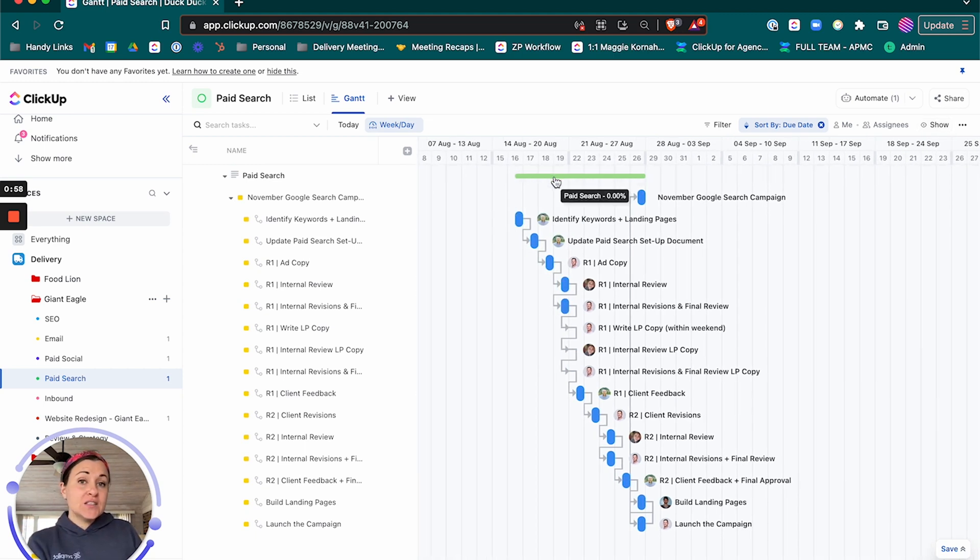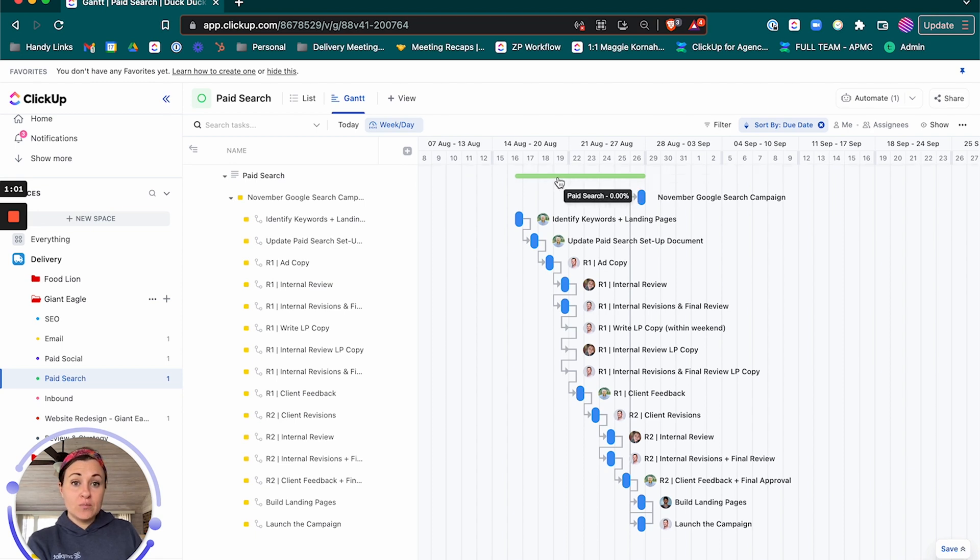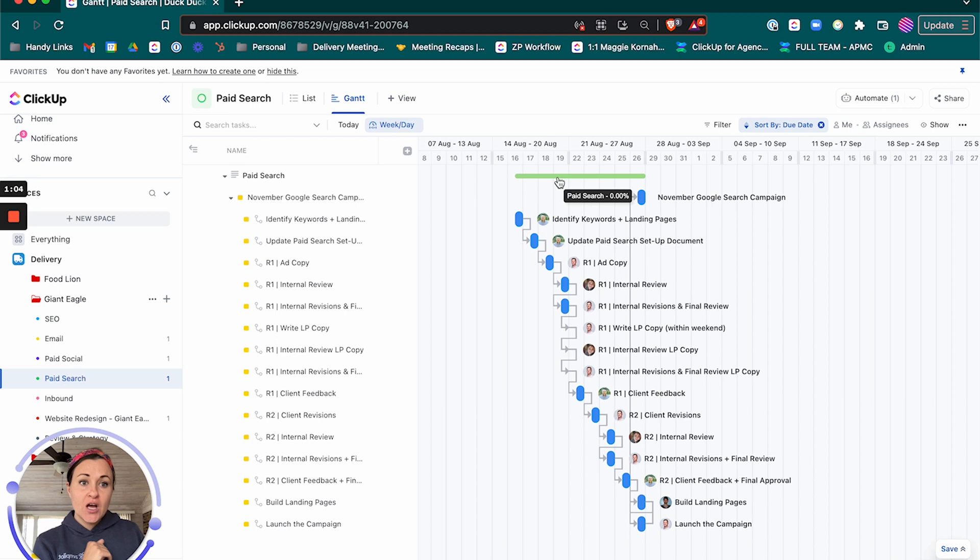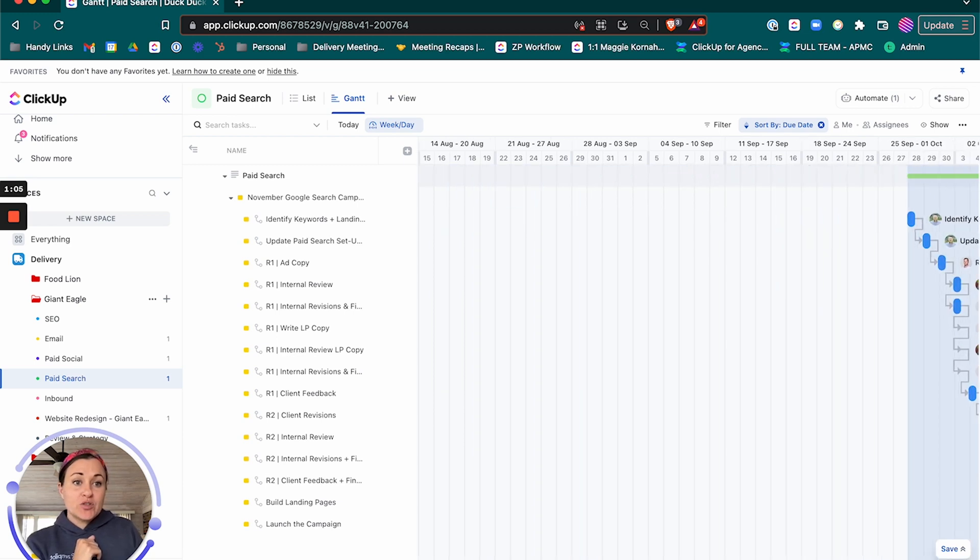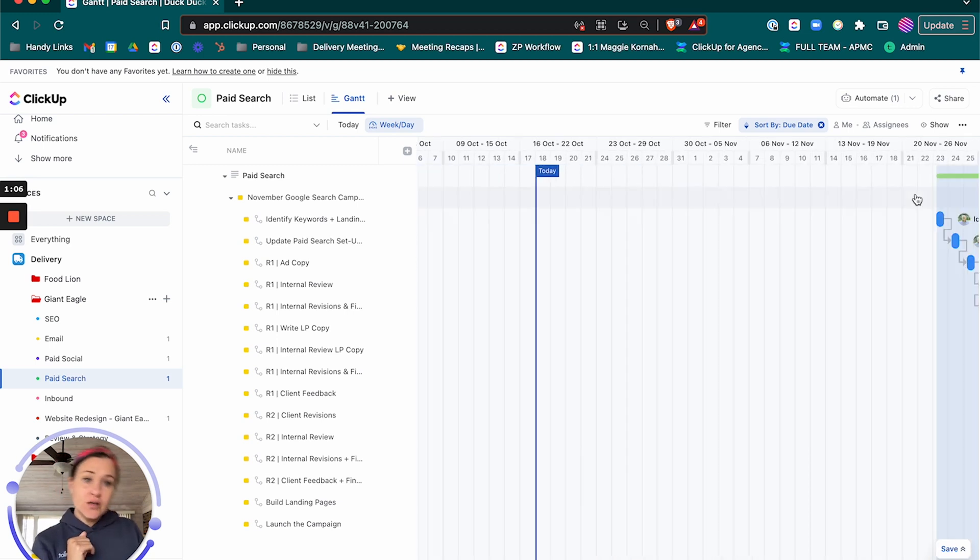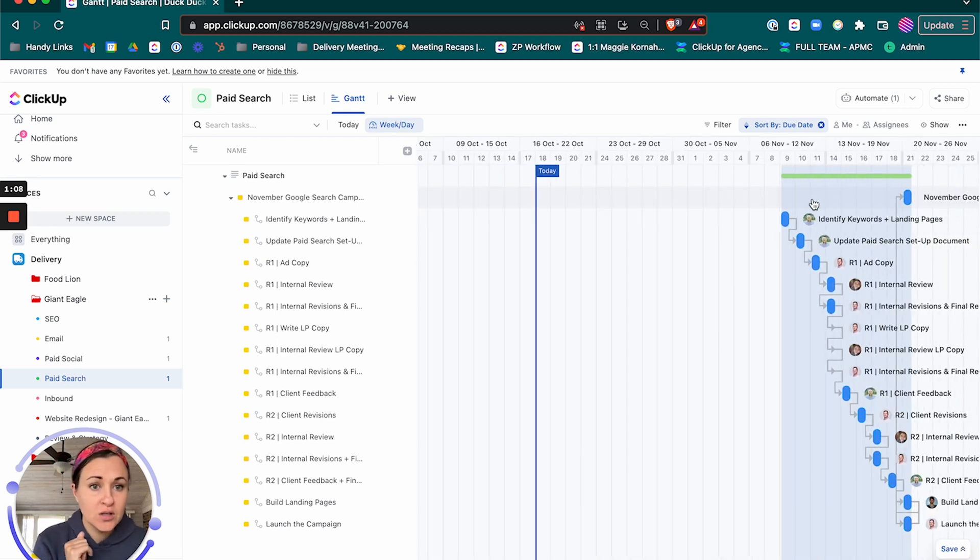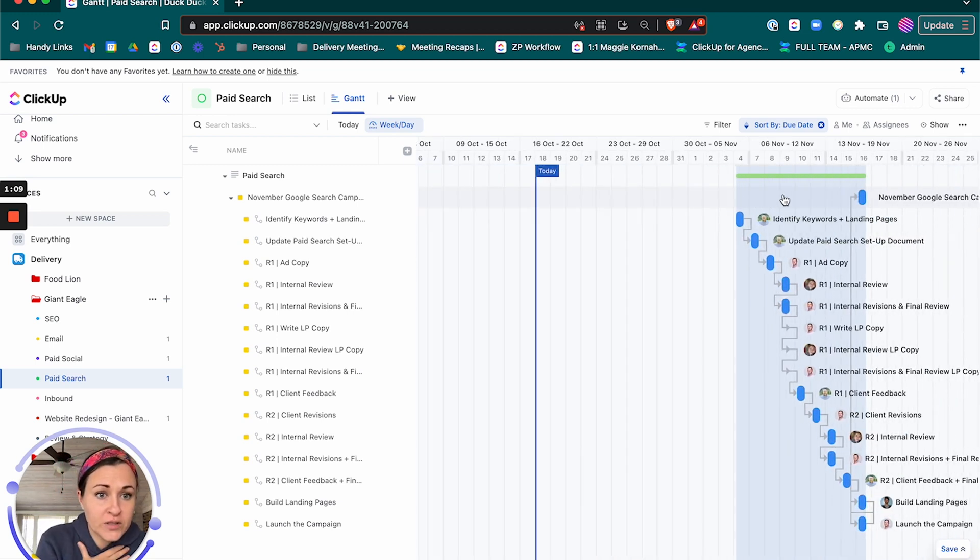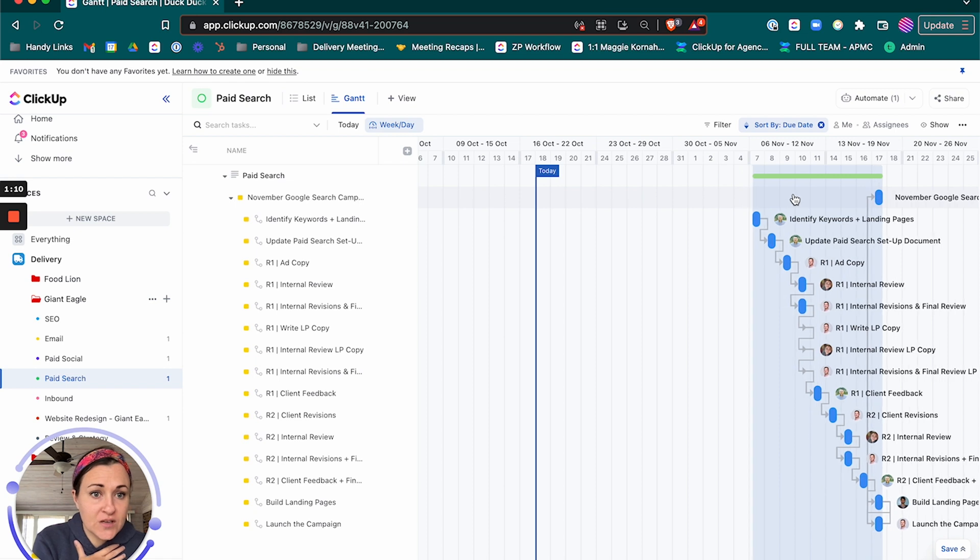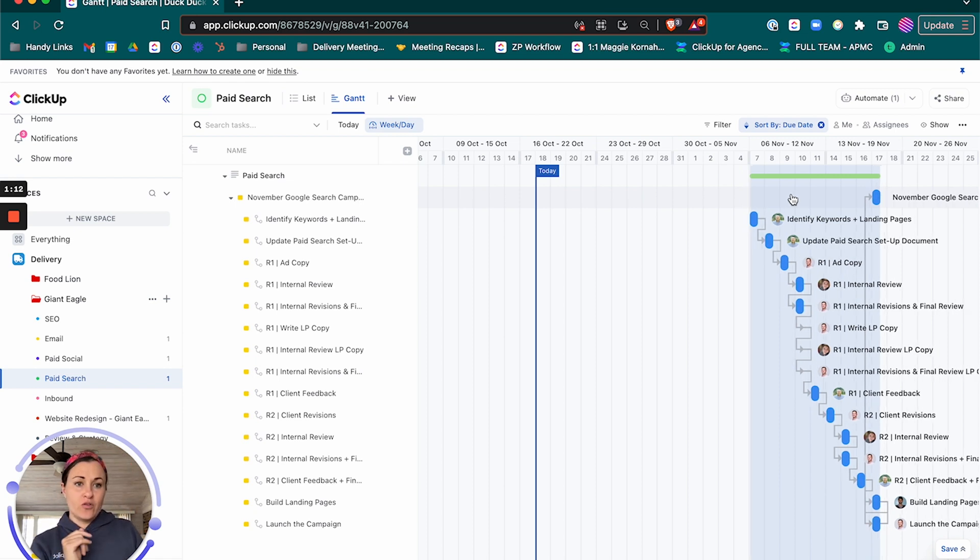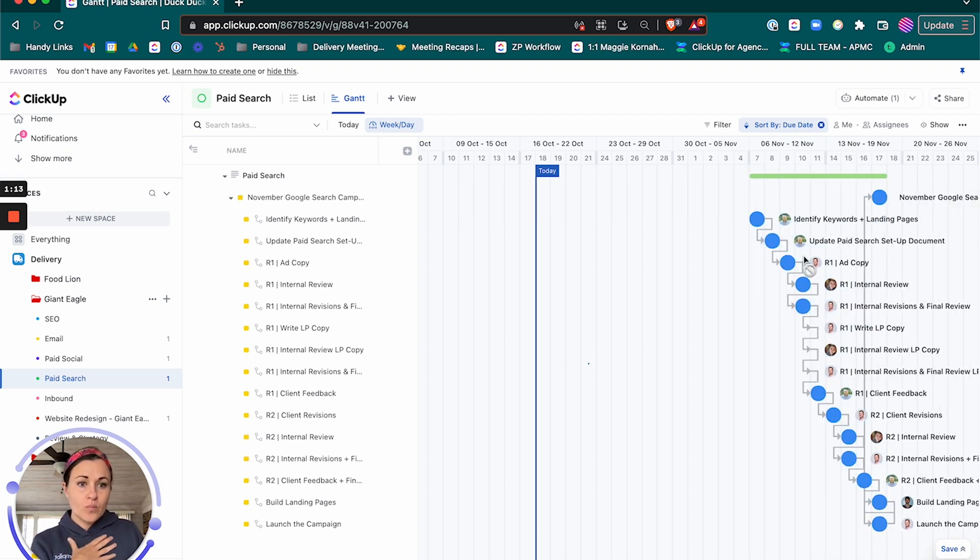And the easiest way to do this is to just grab this green bar because we're moving the entire project. Let's grab this green bar and let's drop this in the first week of November, first full week of November. Perfect.